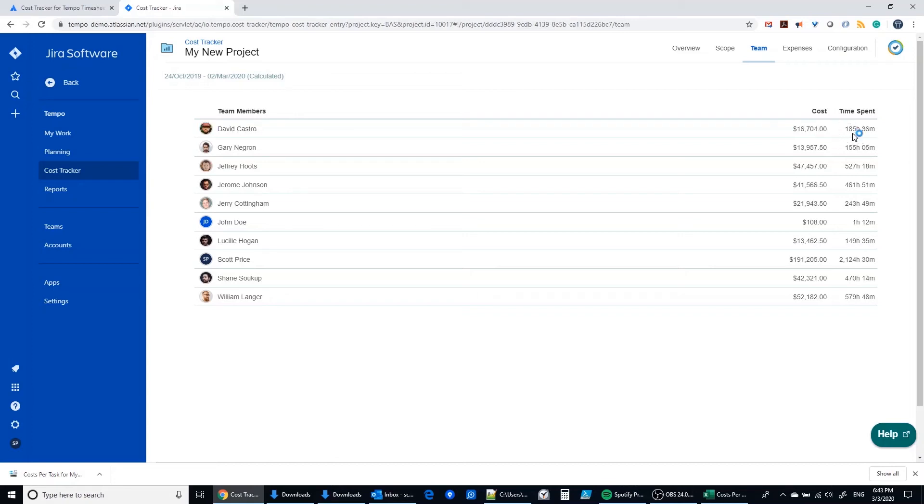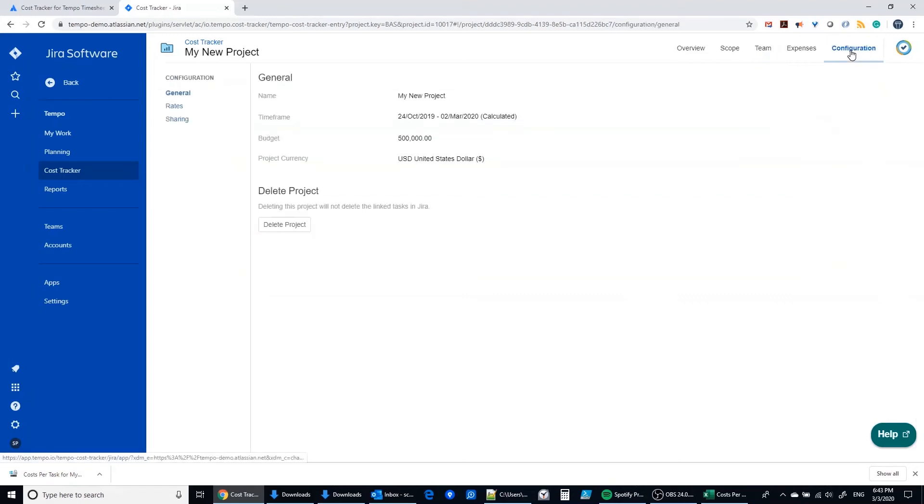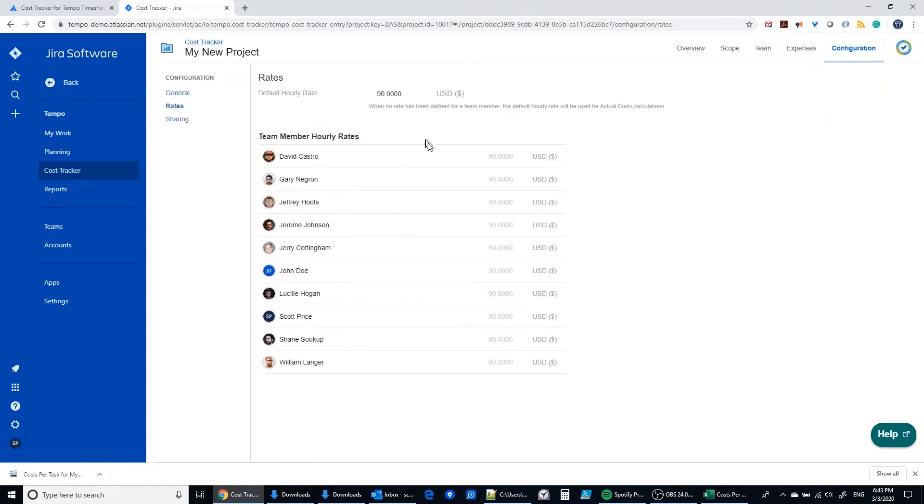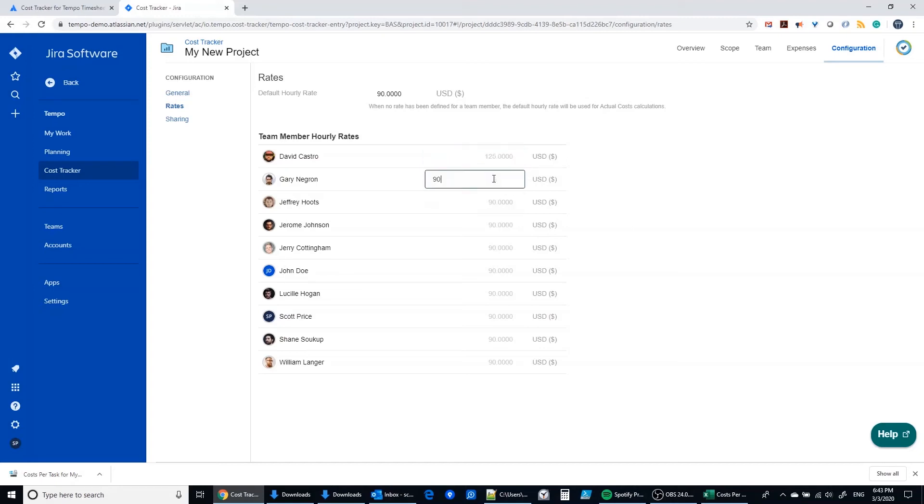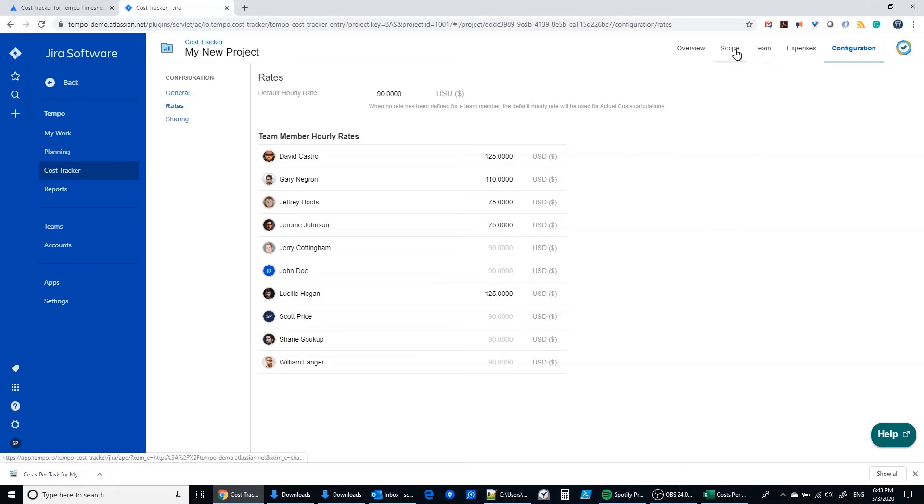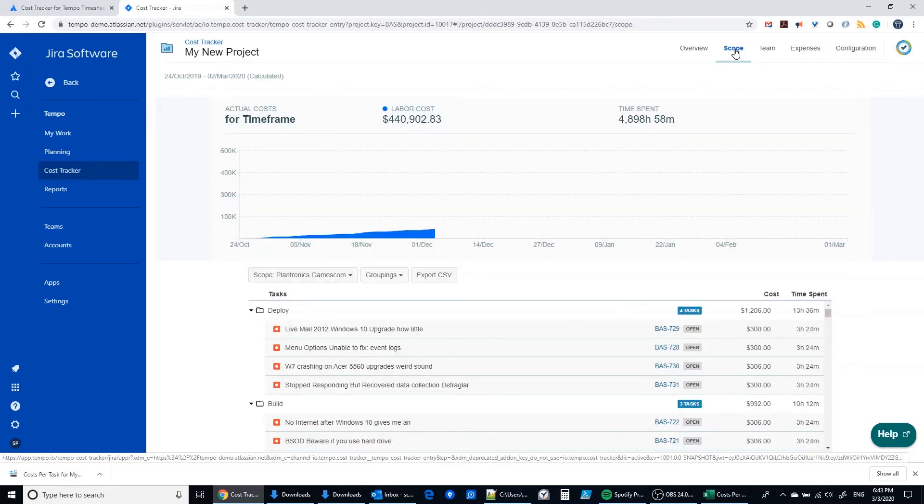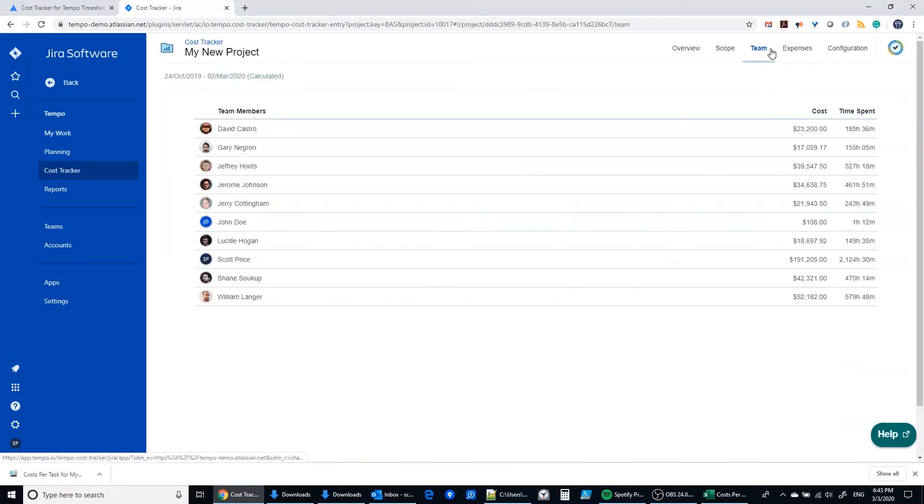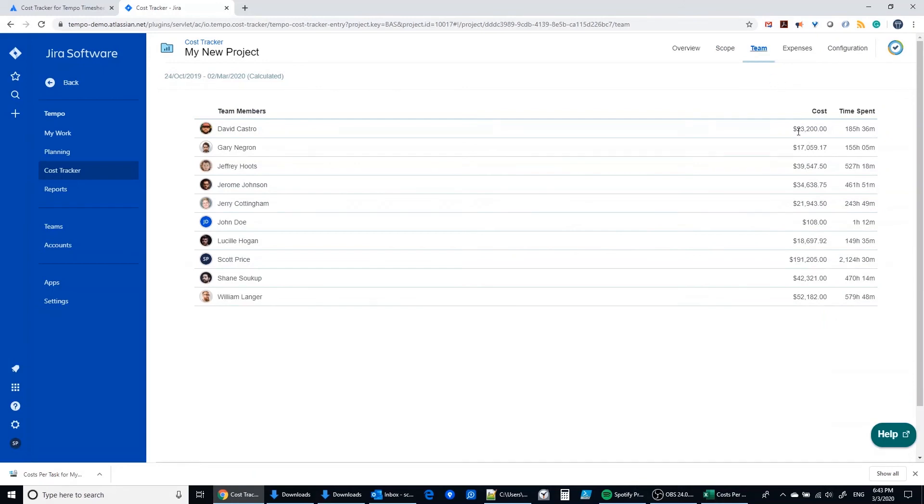Now we can also go into the configuration area under rates and we can establish a rate that's different than the default for each of these folks if we want to. Let's say that David is the most expensive developer at $125, Gary is $110, Jeffrey is fairly new say he's getting $75, Jerome's getting $75, and Lucille here is equally high paid with David, and on and on you go. And then when you go back to the team section, now the cost is reflective of the actual rate that you put in for those individuals distinctly.